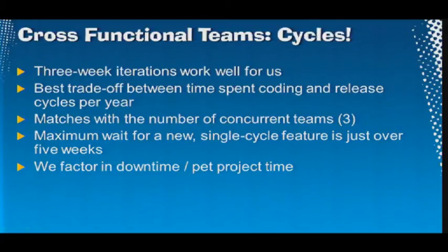And we factor in downtime and pet project time. Developers can't work 100% of the time. They will burn out, they will leave, they will go home and cry, they will eat both pizzas. We don't want them to do that. We want them to have time to think about new things, to unwind, to step away from the TradeMe site, think about some other stuff. Hopefully useful for the business, certainly hopefully useful for themselves from a development point of view, but it's pet project time they can just unwind and work on. Google's got a 20% time thing. This is kind of like that. We don't stick a number on it because it varies, but there is time scheduled in each cycle for our developers to do something other than the cycle work, to unwind a bit.